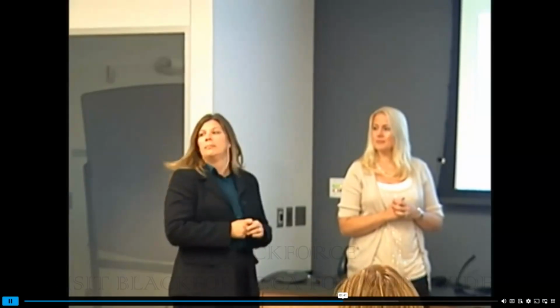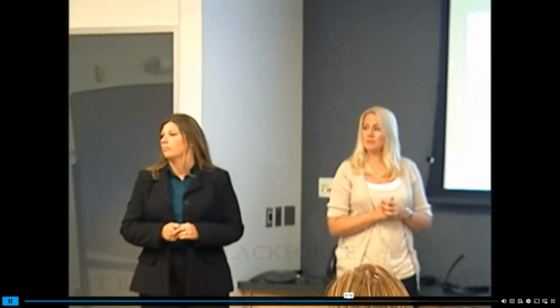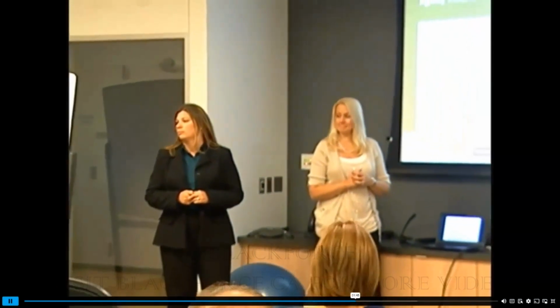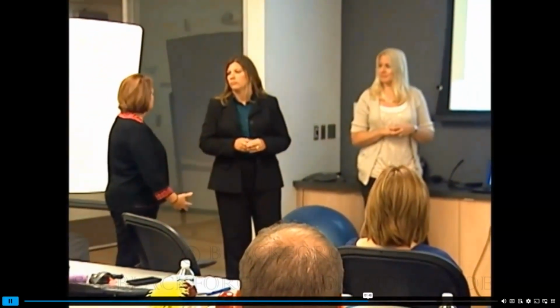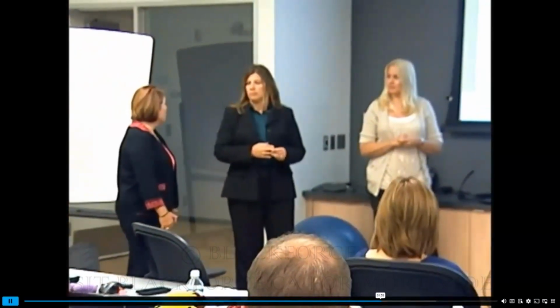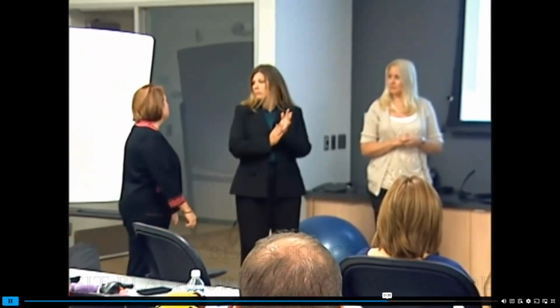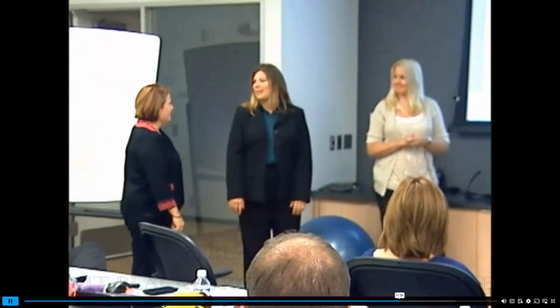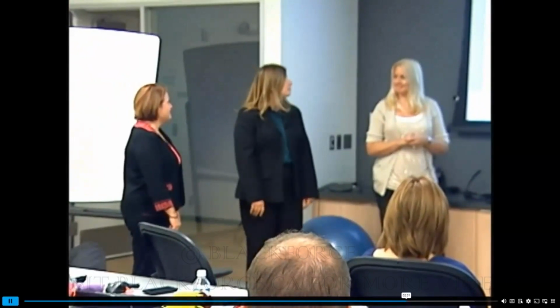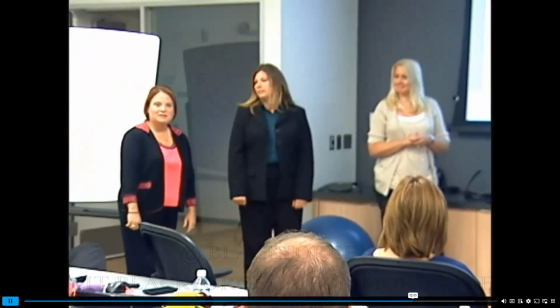Yeah, those are excellent requirements. You bet. We will add those to our product backlog. And Melissa, at our next grooming meeting, we will actually look at those stories and put them in a sprint based on the priority. So thank you. Awesome. That's exactly what we need, some new requirements, things that maybe we never would have thought of. I just can't believe that I'm actually seeing something so soon in this project. It's amazing. It's neat, isn't it? In just 2 weeks, team, well done. Good job. I do want to thank you as well.